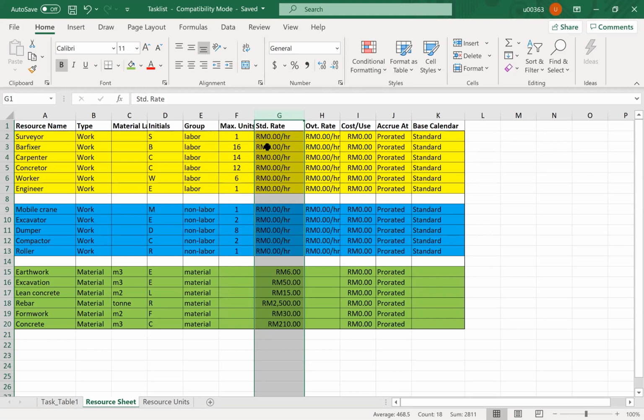You want to show the cost in your Microsoft Project because the file might be shared with the client, and normally the client would like to see the tender value similar to what is put into the items inside your Microsoft Project, so that they can track the progress. In the BQ you already have the unit rate that you input during the tender.